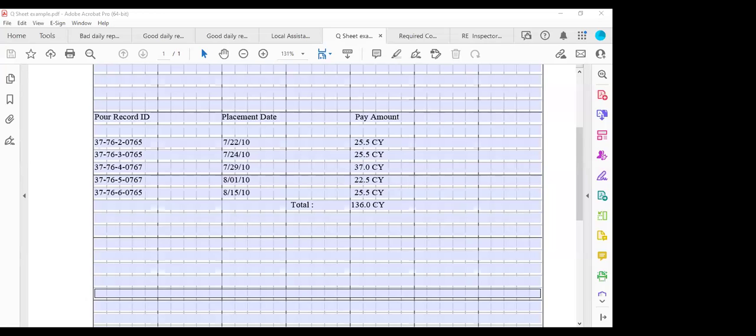So I think if that daily report is not enough to cover all the bid items, most likely there's more than one contractor working, multiple contractors. In that case, I would recommend having separate daily reports for some of the contractors, the subcontractors. So if you have more items to cover than what is shown on the form, probably you need another daily report for the other subcontractors. Some even do a different daily report for each subcontractor. That would be fine too.